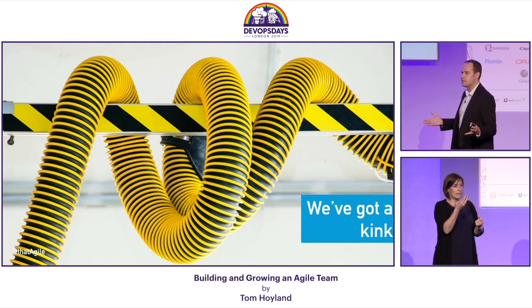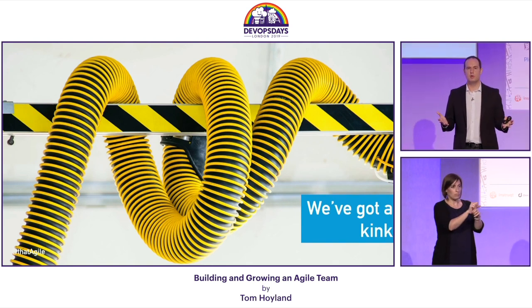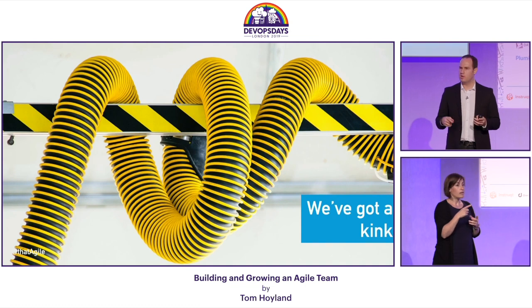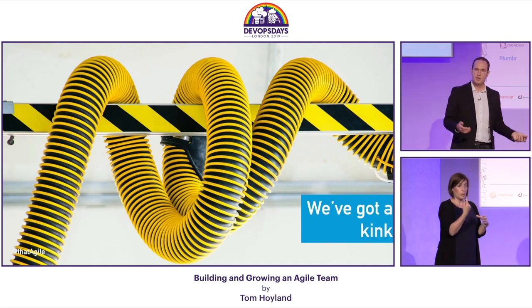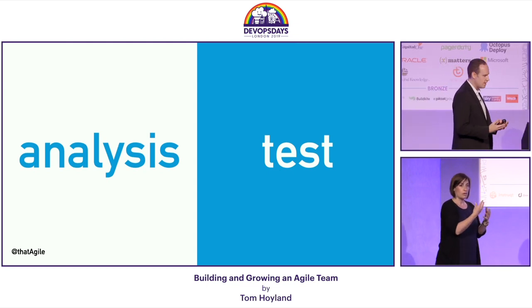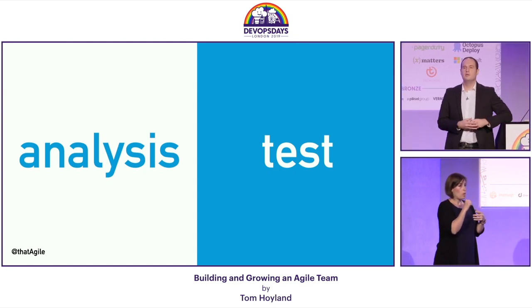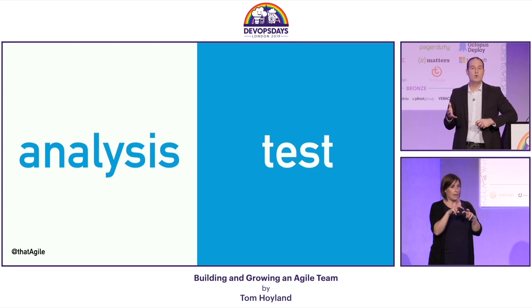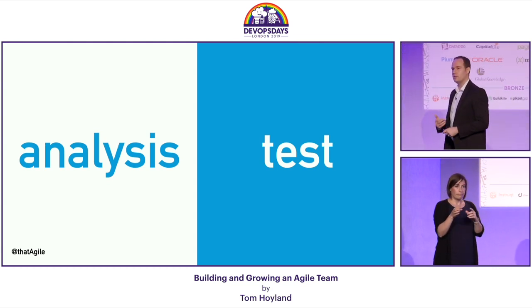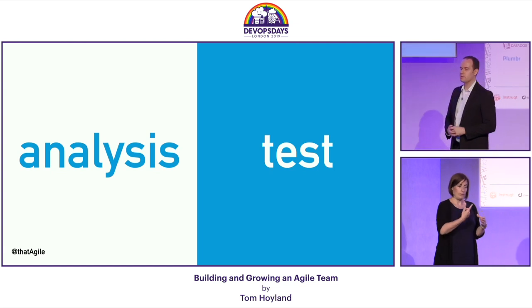And I'm not going to give a prize out to the person that can guess where the bottleneck's going to be. If you've got a team, and it's pretty heavy in software engineers, you've got one business analyst and two testers, you can guess where those queues are going to start to form: in analysis and test. So we decided to do something about this, but we didn't want to add more people to the team. We didn't want to take people away. We wanted to see how we could deal with this challenge ourselves as human beings.